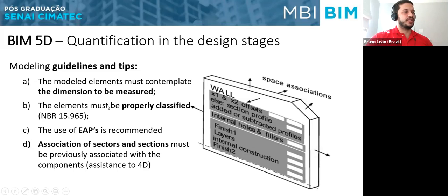Another one that's quite important is that the elements must be properly classified. So we have to use some kind of codification or naming of the elements inside the BIM model. I brought here the NBR 15965, which is our main rule here in Brazil for the codification of this kind of work.